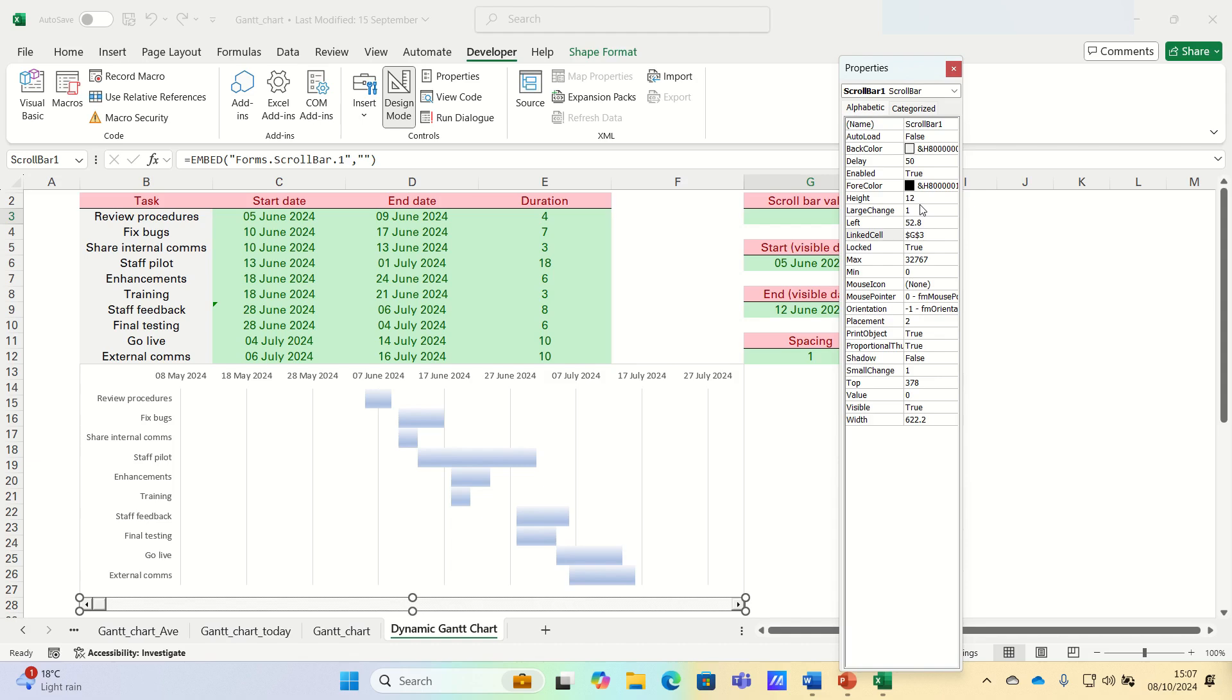This ensures that, as we scroll, it moves one day at a time, in line with the spacing setting that we decided on earlier. For the max, find the difference between the end date and the start date in your project. In our case, this is 41. In other words, the 16th of July minus the 5th of June.